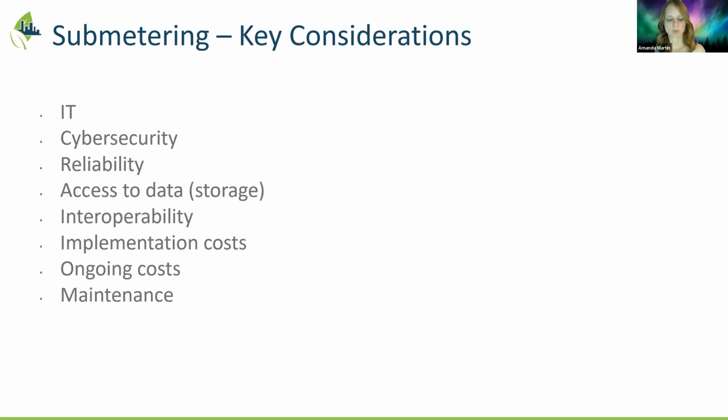And then what we're building up to is creating a standardized scope, standardized designs, brands. It depends what type of data you need, but we're looking at standardizing how long we store the data and what frequencies, 15 minutes versus hourly, tying back to one central platform. We did try several different types of meters and found they all had pros and cons. It was good to test and it was insightful, but now, to manage the number of login credentials we need to maintain, we're looking to move to one centralized platform.